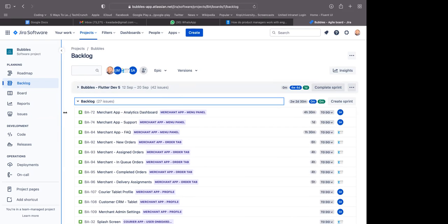Because customer development is gathering all this data. And then when we come to prioritization, the RICE framework stands for reach, impact, confidence and effort. So the R in the RICE framework means you pick up the product user stories that have the most reach, which reach most of the customer base or cover most of your business needs and customer needs. That's the reach.